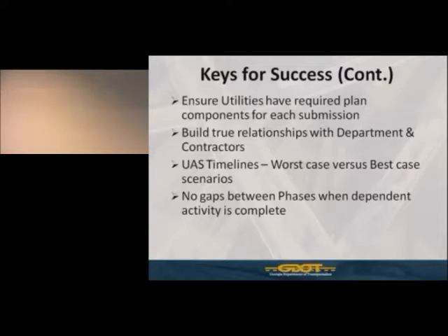I mentioned a little bit utility adjustment schedule timelines, worst case versus best case scenarios. I mentioned the 300 days getting cut down to 150 days. That certainly raises a flag about the effort put in to those utility adjustment schedules. I want to impress upon you as a utility owner that the department is not seeking to put you in a corner or be punitive in any shape, form, or fashion. But neither can we accept an absolute worst case scenario in a schedule when we are under certain constraints on our contract times. So at the same time, best case scenario for you may be something that you feel somewhat uncomfortable with. So somewhere there should be a happy medium in there, and that's what we all need to work towards and try to develop. And that comes from that relationship and partnership building as well.